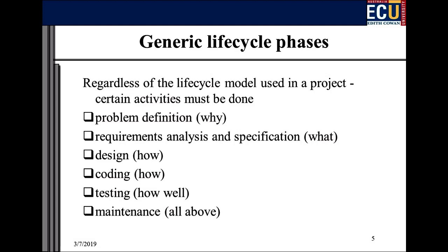The formal way to say that is we're looking for traceability. Because we've got a list of requirements from the user, we've got our specification document, and you should be able to trace each item in the specs to one or more requirements. If you can't trace this thing that you're saying you're going to do to anything in the requirements, then why are you doing that? And the same has to go the other way. Each requirement has to trace to something in the specs document. Because if there's something in the requirements that you haven't covered off in the specs, it means you're not going to meet the requirements. So that's how you test specifications.